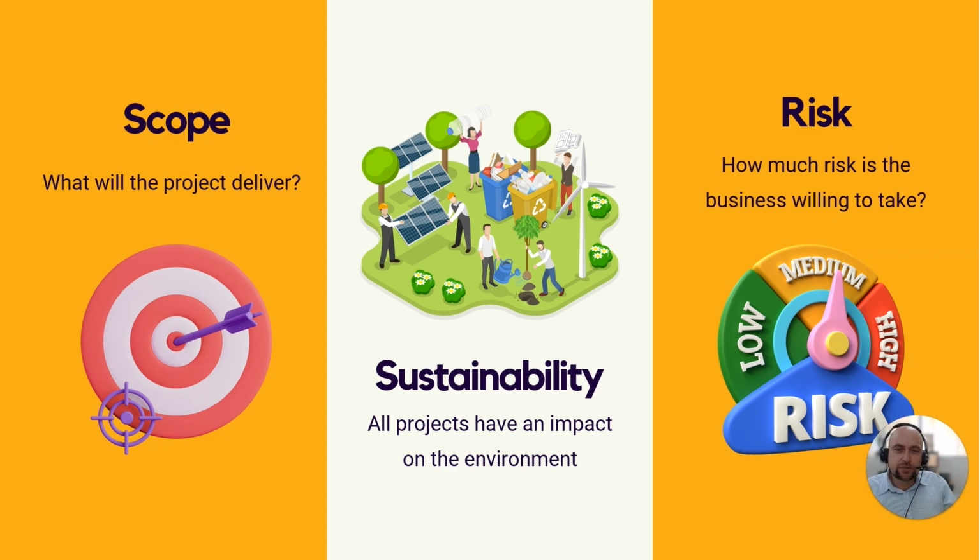Now, the project management team should not deliver beyond the scope, as this is a common source of delays that happen in projects, overspend that happens in projects, and of course, uncontrolled change, which we sometimes refer to as scope creep, which can have quite a detrimental effect on a project and cause project failure.